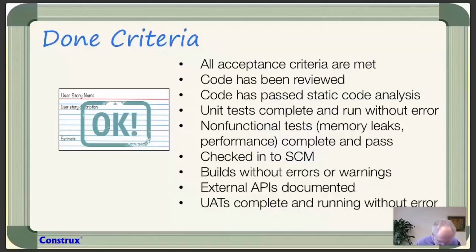All this stuff down here is more the acceptance criteria of the team that says what it means to be done with a story. Here's the team protecting its interest about having maintainable software that we can use and work on over and over and over again. And so not only have the acceptance criteria from the consumer on top, but we have the acceptance criteria of the team to say, what does it mean we have good code that we're happy to work on again?